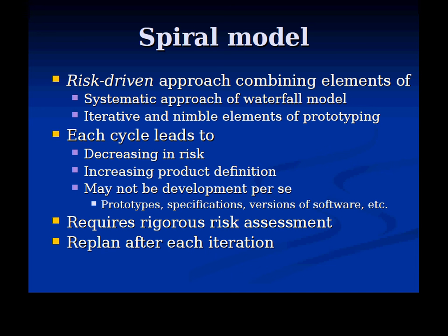And there's a back and forth involving how long does it take, how much value would it deliver, how important is it for reducing the risks in terms of certain technologies. And they come to terms every 3 weeks or every 2 weeks in terms of what they'll deliver. So, in short, I want this incremental delivery.